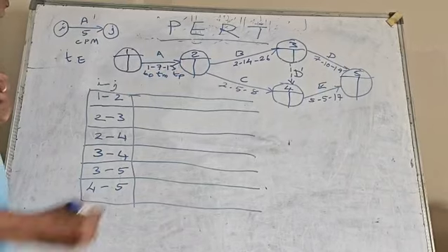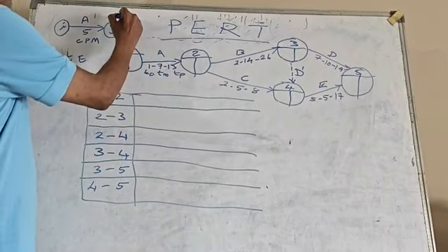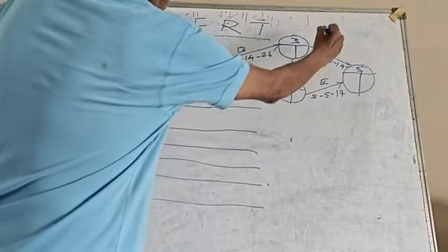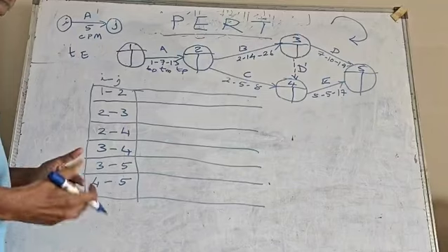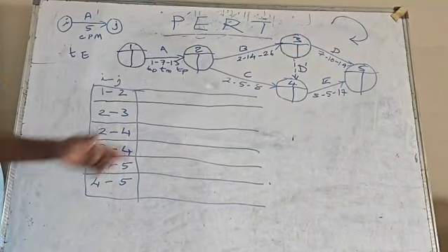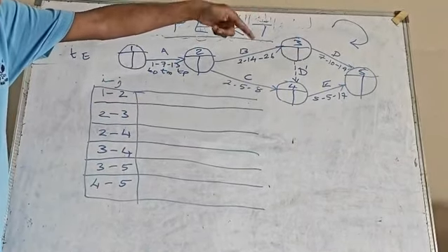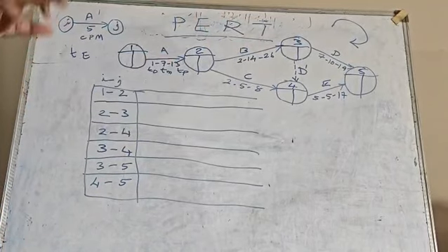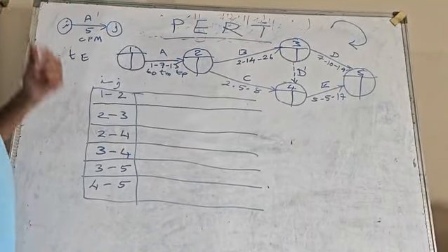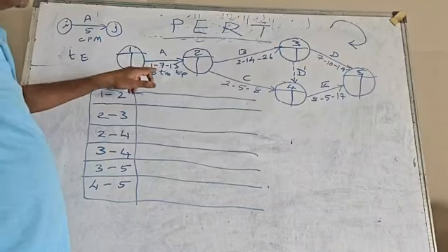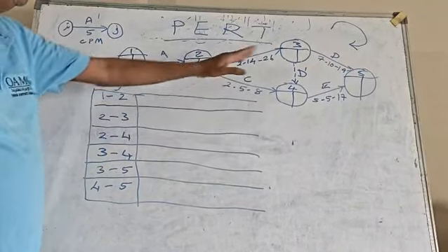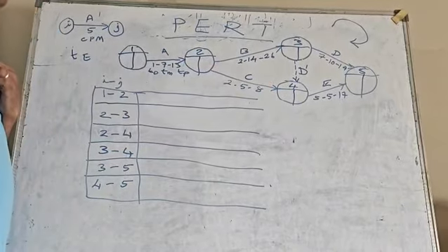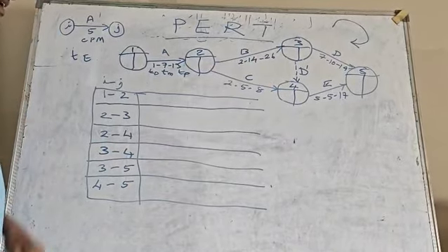What the Fulkerson rule says is that we have to number from top to bottom in a clockwise direction, either activities or event numbers, in the direction of the arrow as I have shown. Now I have already marked T0, Tm and Tp on all the activities, as you can see. I have considered this as a numerical example.